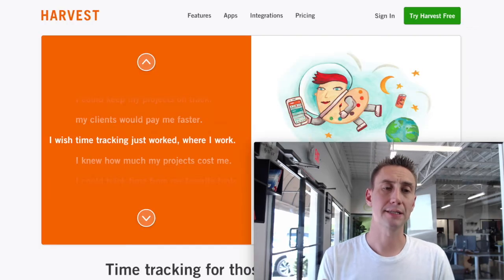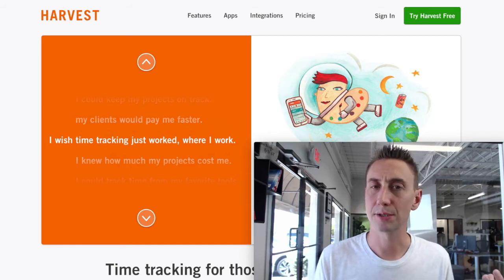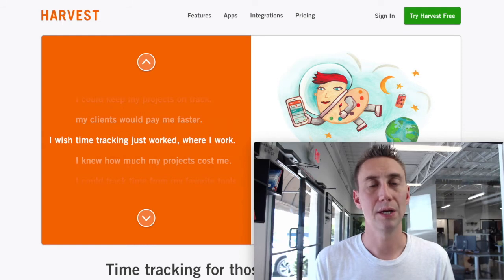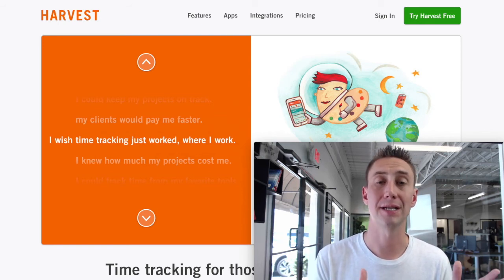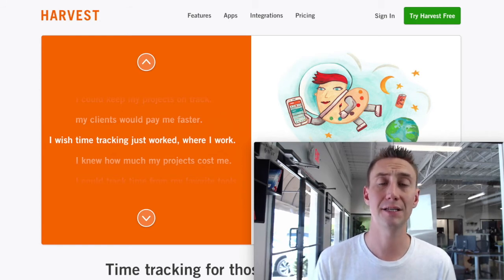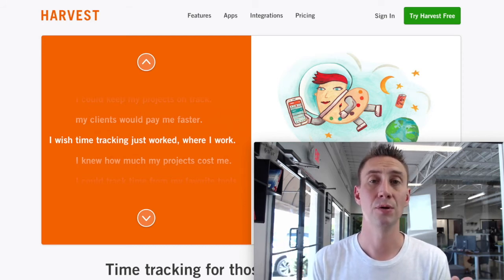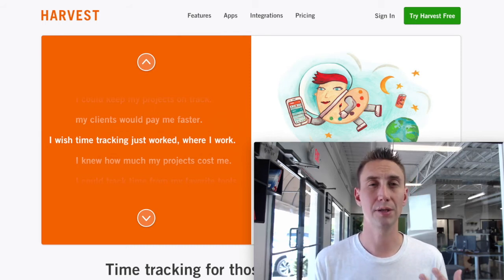On the time tracking side, at Paracore, we do fixed rate billing. We do a monthly retainer billing. However, that does loosely correlate with the amount of time that we're spending on each project. So we use Harvest so that all employees can track their time in the Harvest platform and then assign it to a project. And once a week, our account manager sends an email to the entire team saying, hey, these are the number of hours that you've spent on this project, this is the project's budget, and this is how much time you have or don't have to work on that project. We go over budget somewhat frequently. We try to avoid it.